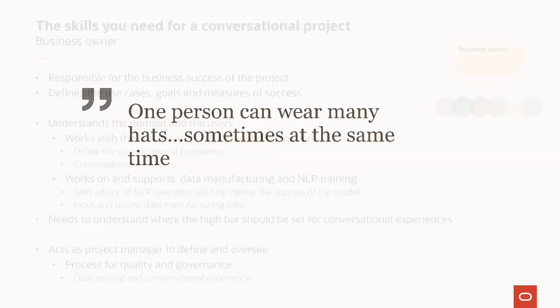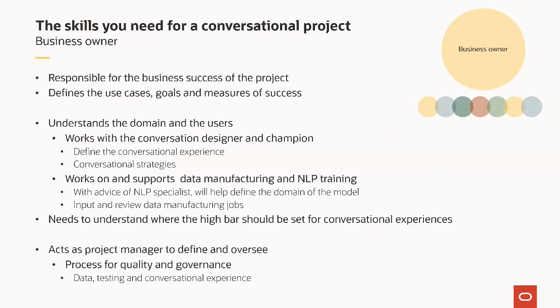Now, let's look a little bit more in detail. Business owner. So think about this person as the project manager, right? This person owns the project from the business side, is responsible to sign off on the use cases, the goals, how to measure success, right? So this person, unlike a typical project manager, will be involved in all the steps along the project lifecycle, and the input of the business owner will be very valuable in several steps.